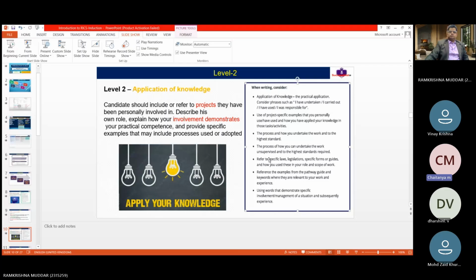So we have to send letters to the client, I mean the consultant, as per the FIDIC rules, saying the contract price, the value of the BOQ, has risen more than 20%, and that we would like to send a variation letter for the same. At the same time, we send it to procurement to negotiate with the suppliers and have a backup plan. We used to do this type of application to save money, by applying variations or negotiating with suppliers, looking at whatever possible ways to handle the activity impacts.